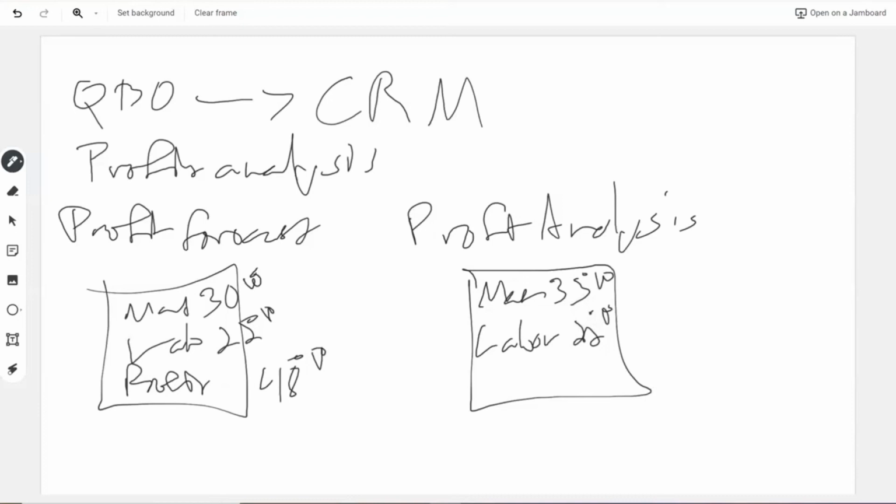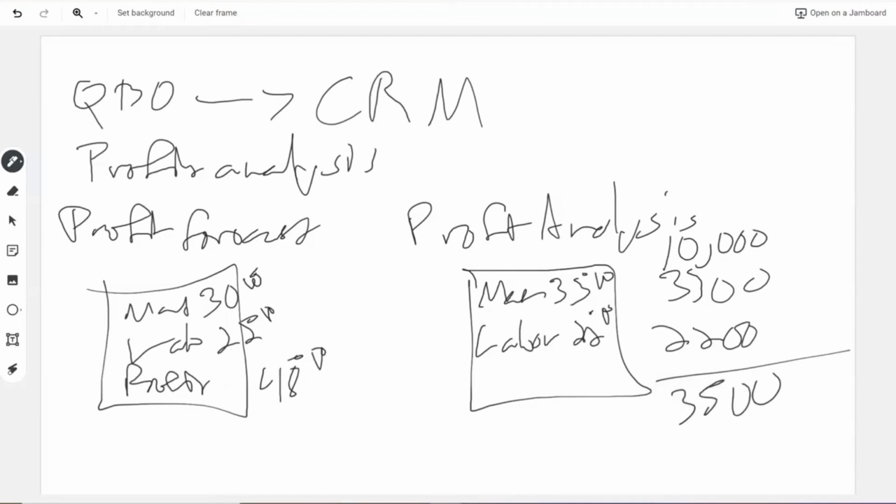So that was 3,300 and 2,200 on a $10,000 job. Your total expenses on this were 5,500, which came out to 4,500 in profit, or 45%. When I look at this, I can set the variance threshold. Our accountant, anywhere there's a 2% variance, comes to me to let me know, so I can look at it and say, okay, why did this job not come in profitable?